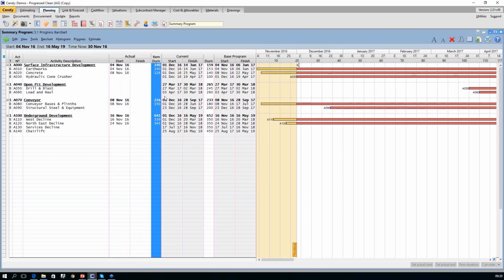So think about it. If you're going to extend the remaining duration past the original duration of that activity, your forecast will move out as well. So your remaining quantities will be spread across a longer duration for this project. That's a change we've made, so we still need to go and redo the forecast to update for these changes.